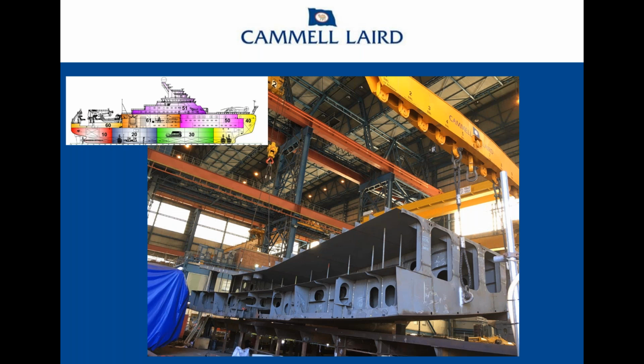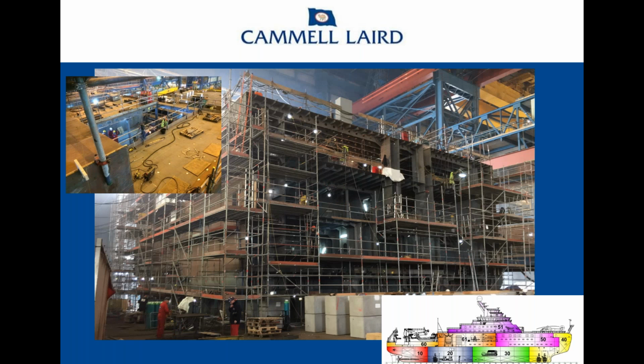They're in, sealed. So these units go in as fully commissioned systems, and they will not see the light of day again. And if you look, while we're talking about that, over to block 20 on that same picture, you'll see the twin electric units in there, 125 tons, that were installed just in the new year and are sitting there fully encased in marine ply, ready for the final testing.